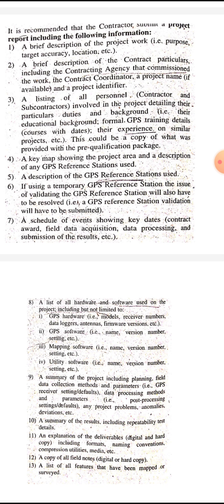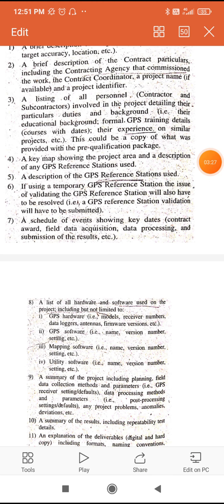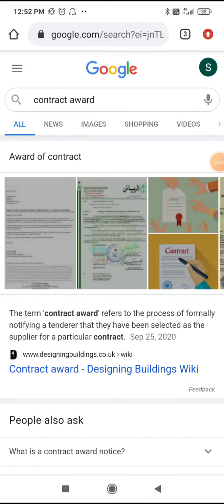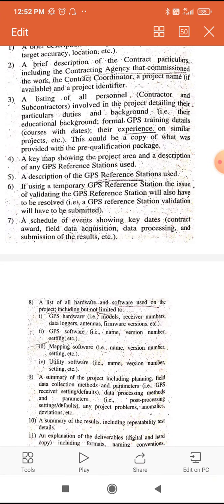A schedule of events showing key dates should be included — that is, contract award, field data acquisition, data processing, and submission of results. Contract award refers to the process of formally notifying a tenderer that they have been selected as a supplier for a particular contract. These schedule of events and their dates should be noted in the report.